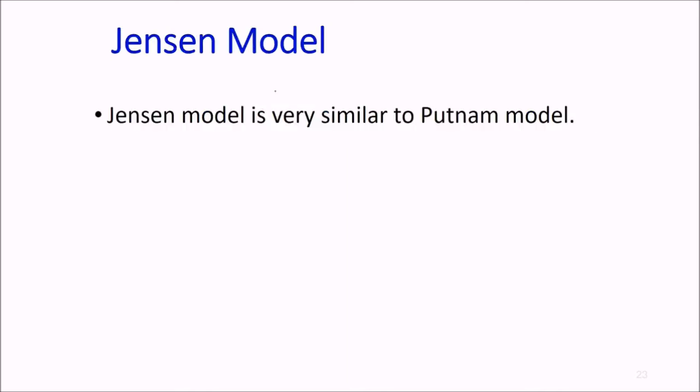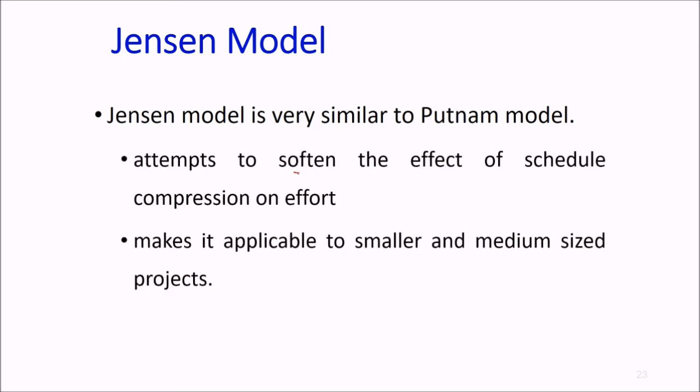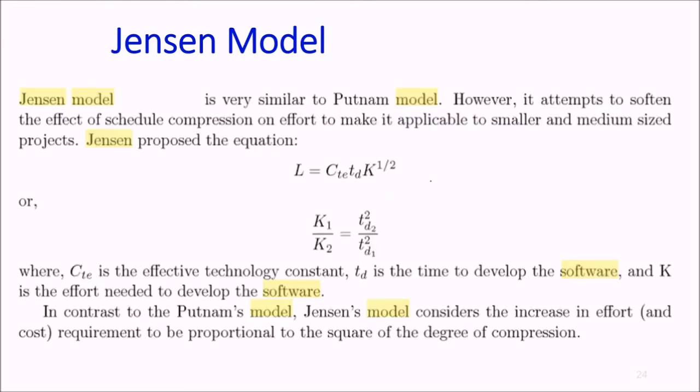The benefits can be gained by using fewer people over a somewhat longer time span. By the expression we presented, if estimated development time is 1 year, then to deliver the product in 6 months, TD becomes half year. So the total effort and cost increases by 16 times, 2^4 = 16. The relationship between effort and chronological delivery time becomes highly non-linear. Putnam model indicated extreme penalty for schedule compression and extreme reward for expanding schedule. Putnam estimation model works very good for very large systems but seriously overestimates effort for medium and small systems. Then came the Jensen model, which is very similar to Putnam model. It attempts to soften the effect of schedule compression on effort and makes it applicable to smaller and medium sized projects. Jensen proposed L = CTE * TD^(1/2), where CTE is the effective technology constant. In contrast to Putnam model, Jensen model considers the increase in effort and cost to be proportional to the square of degree of compression, not to the power of 4.